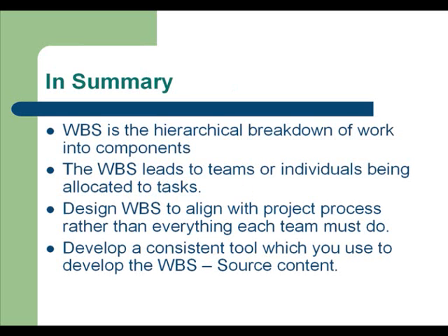So, in summary, a work breakdown structure is the hierarchical breakdown of work into components, starting off with a high-level activity or objectives, breaking down into tasks and then subtasks. The accumulation of all the subtasks, once that work is complete, the objectives should be met and finalized. The work breakdown structure leads to teams or individuals being allocated to tasks. Once we know what has to be done, we can now allocate the who. The design of the work breakdown structure should align with the basic principles of the project process rather than everything each team must do being accumulated together.